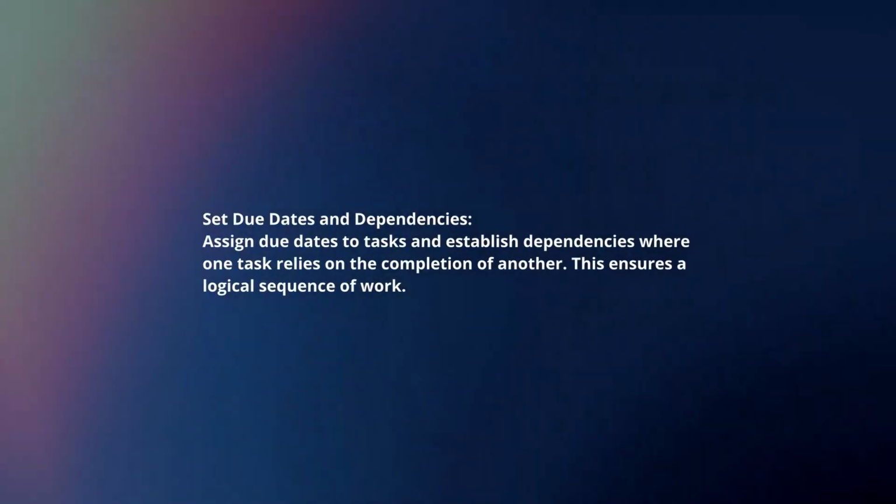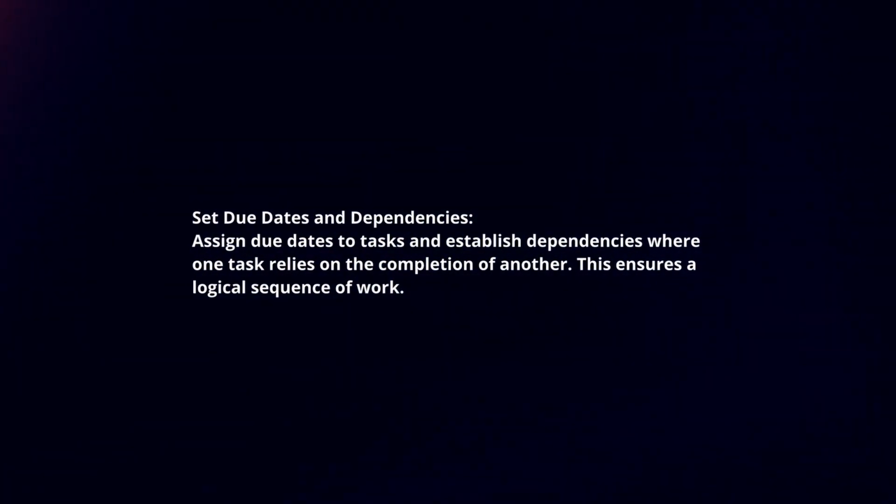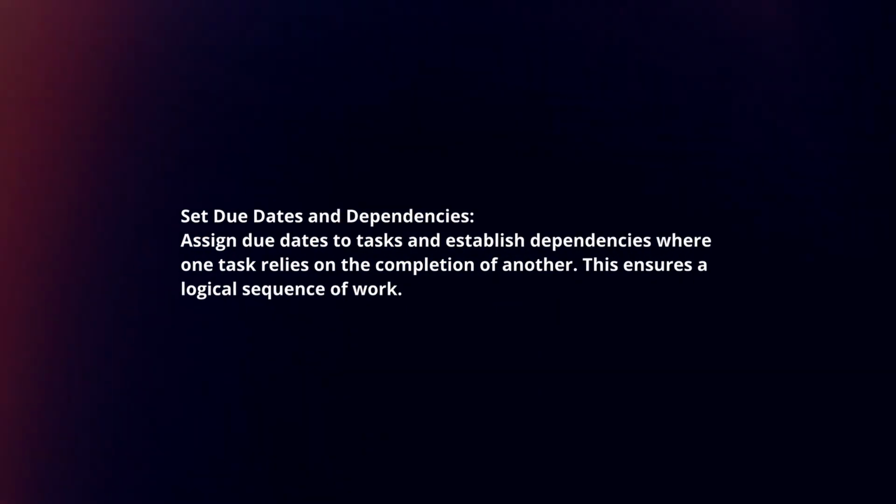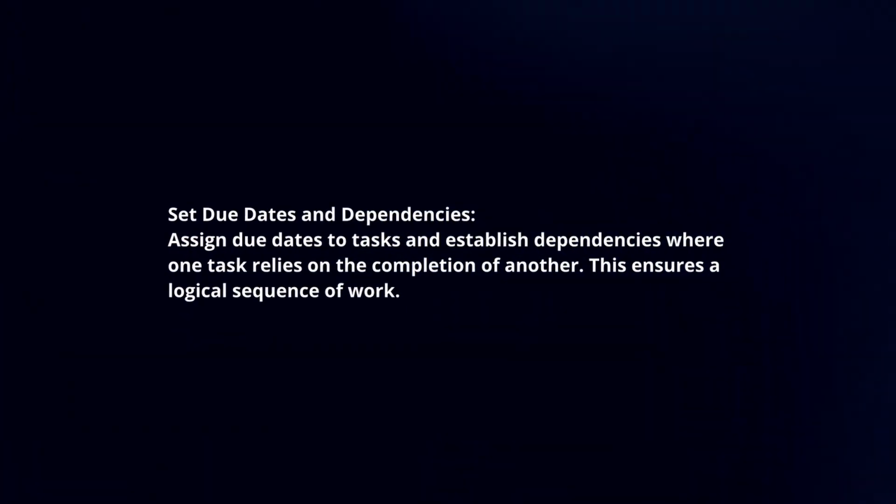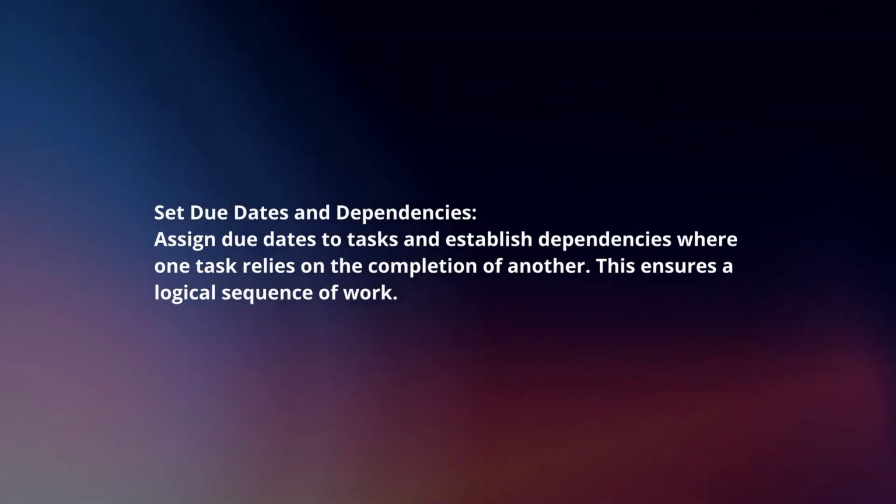Set due dates and dependencies. Assign due dates to tasks and establish dependencies where one task relies on the completion of another. This ensures a logical sequence of work.